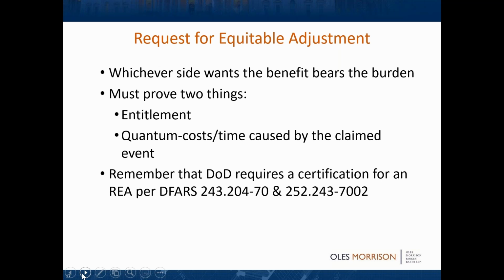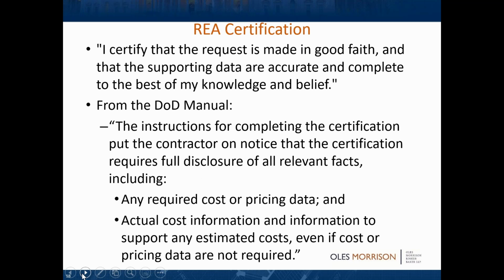And remember, just like with the Contract Disputes Act, the REA has to be certified. In REA certification, I certify that the request is made in good faith and that the supporting data are accurate and complete to the best of my knowledge and belief. Got to have that on there, and what that means is you're opening yourself up to a false claims prosecution. So you really want to make sure that what you put in there is supportable with actual cost or pricing data.